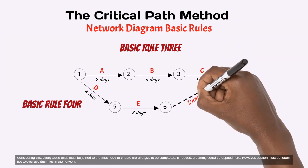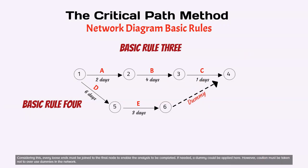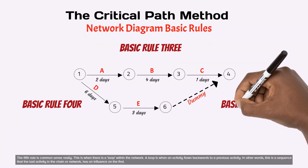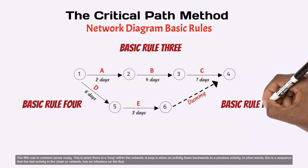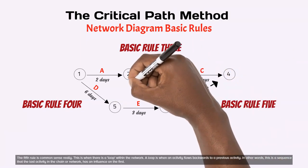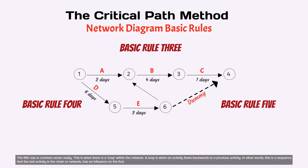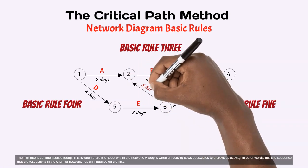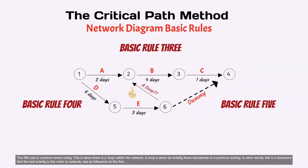However, caution must be taken not to overuse dummies in the network. The fifth rule is common sense really. This is when there is a loop within the network. A loop is when an activity flows backwards to a previous activity. In other words, this is a sequence where the last activity in the chain or network has an influence on the first. These are the five basic rules to drawing a network diagram. Feel free to pause the video here to memorize these rules.